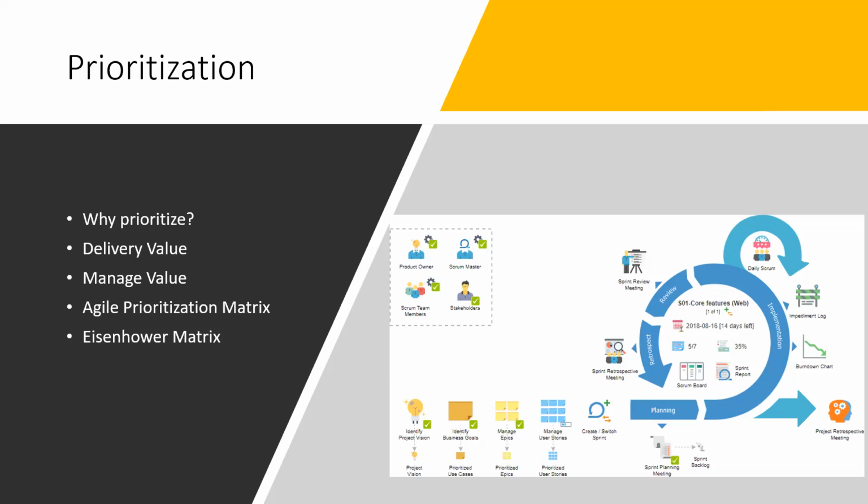I'm just giving you examples, and there may be other things, like when I click on the movie, it should play the trailer for me. That's a nice to have feature. I need not have it at the start of my development. I can have it somewhere down the line, so that I'll have some resources to develop it later. But for me to start, I need to have theaters, movies. I need to have the infrastructure, like cloud or SQL databases, whatever it is. So you prioritize those big use cases when you're identifying them.